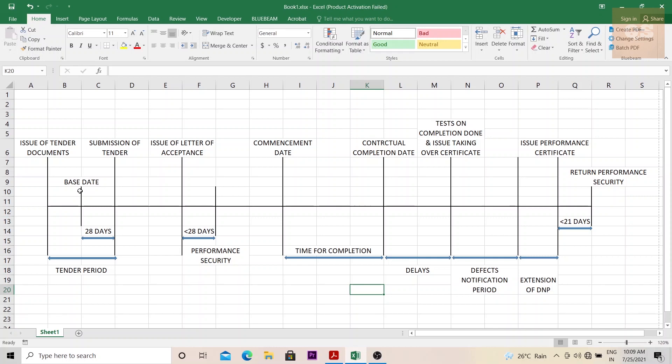Another important aspect about base date is that if there are some rate of exchange being done in this project, for example, this project will be quoted in US dollars but the project will be carried out in some other location, maybe in Gulf, in UAE. So the amount that is being paid will be in terms of dirhams. If there is no rate of exchange being mentioned in the tender documents, whatever rate of exchange was prevailing during this base date will be used for the entire project for the payment, like for the conversion of the rates. Whatever the rate that is determined by the central bank of that country on this particular base date will be used for the entire project for the payment of the local currency.